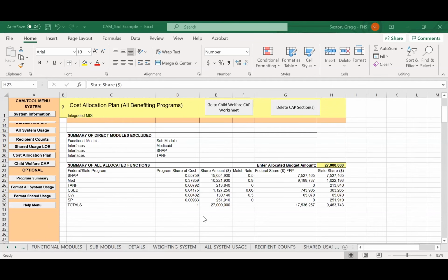So for instance, if you have state staff and you say they're in the project 50% of the time, well, you're going to have to track that, but you're going to say half of their time. You have a subset of state staff, half their time's on the project. The total cost to the project is X amount of dollars. You're going to allocate those costs to all the programs, as long as they're not in there, and only should be direct charge to one program.